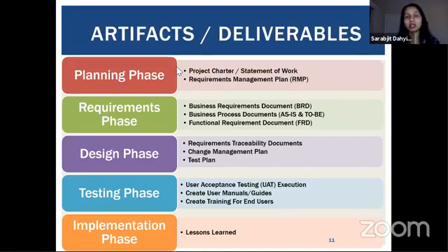It just talks about the how of gathering requirements, meaning, are you going to be meeting with stakeholders in one-on-one interviews? Are you going to be meeting with stakeholders in a group session? So it just talks about your approach on documenting the requirements for that project. And typically, the requirements management plan doesn't change from project to project, right? Because your approach on gathering requirements, at a company level, is typically standard based on what you've done in the past.